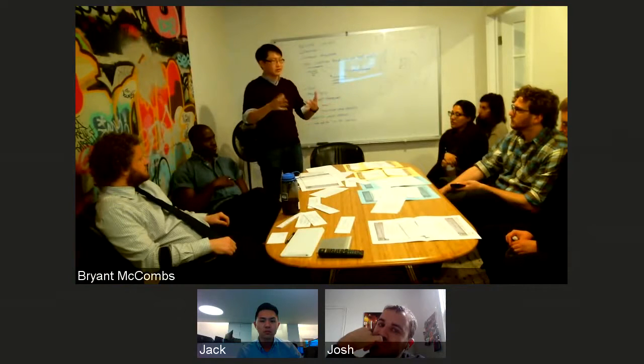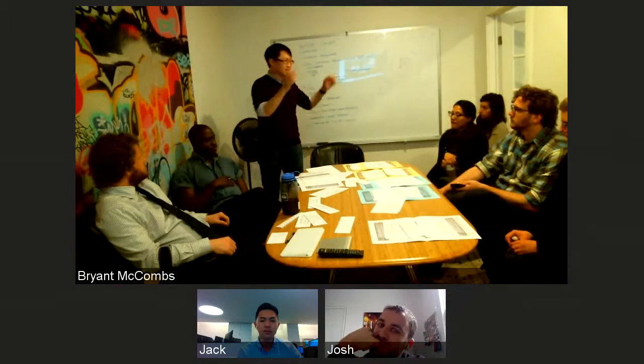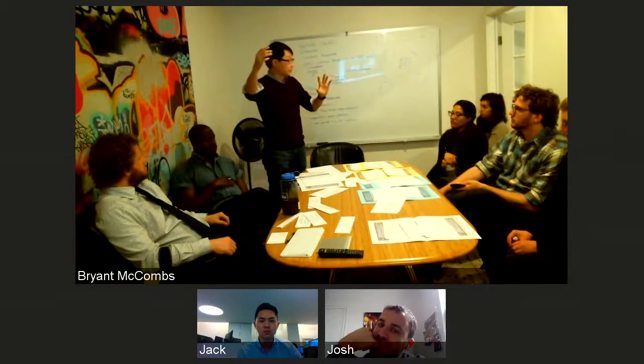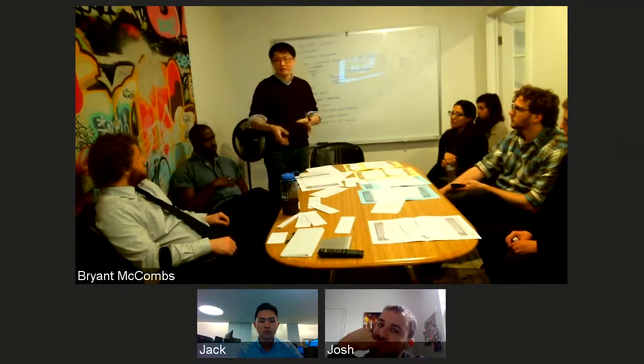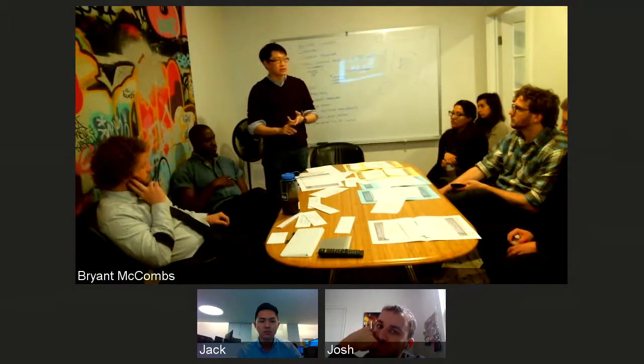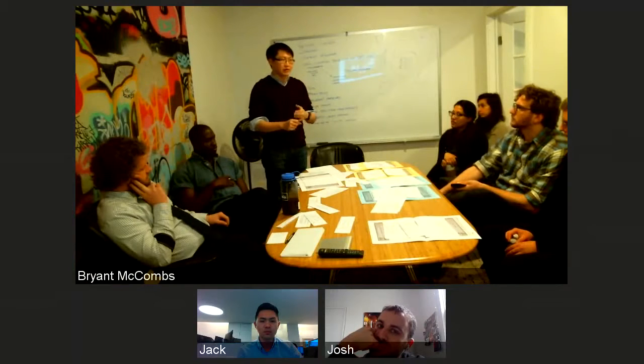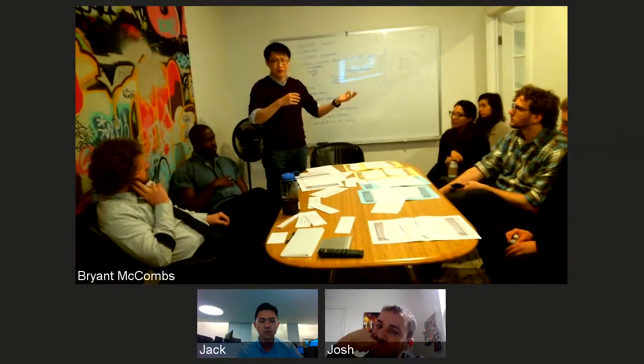Here's the other thing this needs: it needs design and development to run in parallel. Design needs to be a little ahead so that you can estimate their things, but they need to be available to react to things that are going to cost you more time. For example, and that's probably a bad example, but I've seen a few like this: a drop down here will be 5 times as expensive as a text box.